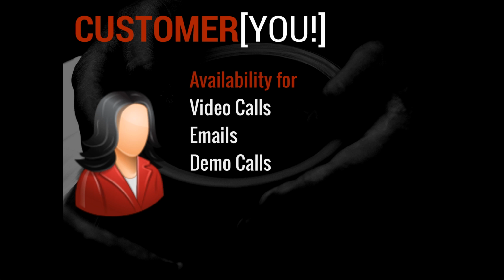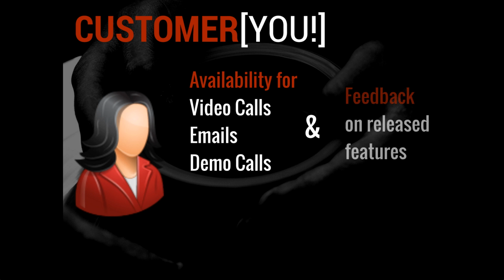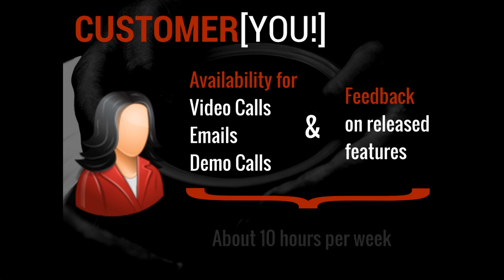As the customer, you're the owner of the product. Therefore, your availability to answer our questions would be your main responsibility. This includes the time for doing video calls, answering our emails, attending demos, and providing feedback on the release features. This translates to about 10 hours per week of your time.